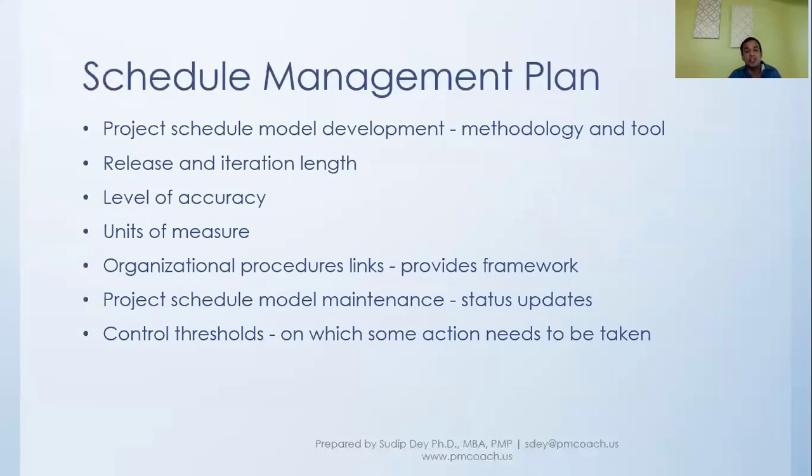So we'll have a threshold, and typically if there is a delay of, let's say, 10-15 days, we might confer with our stakeholders, raise an exception report, inform our user, and then come together and see how we need to correct the situation. Is it a trend? Will there be more delay going forward? So there has to be some action taken when we cross that threshold.